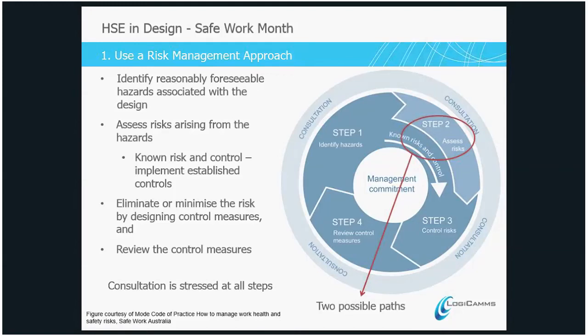In assessing the risk, you go into more formal processes of HAZOPs and other methods of going through the hazard identification, the risk mitigation, and how you're going to control that from a design perspective. Obviously, step 3 is that all those risks we're aware of need to be managed, either through a standard or through what we've done through our workshops, and come up with solutions to mitigate these risks. And then there needs to be a process of review and control of those measures as we close out designs and then move those designs to implementation.